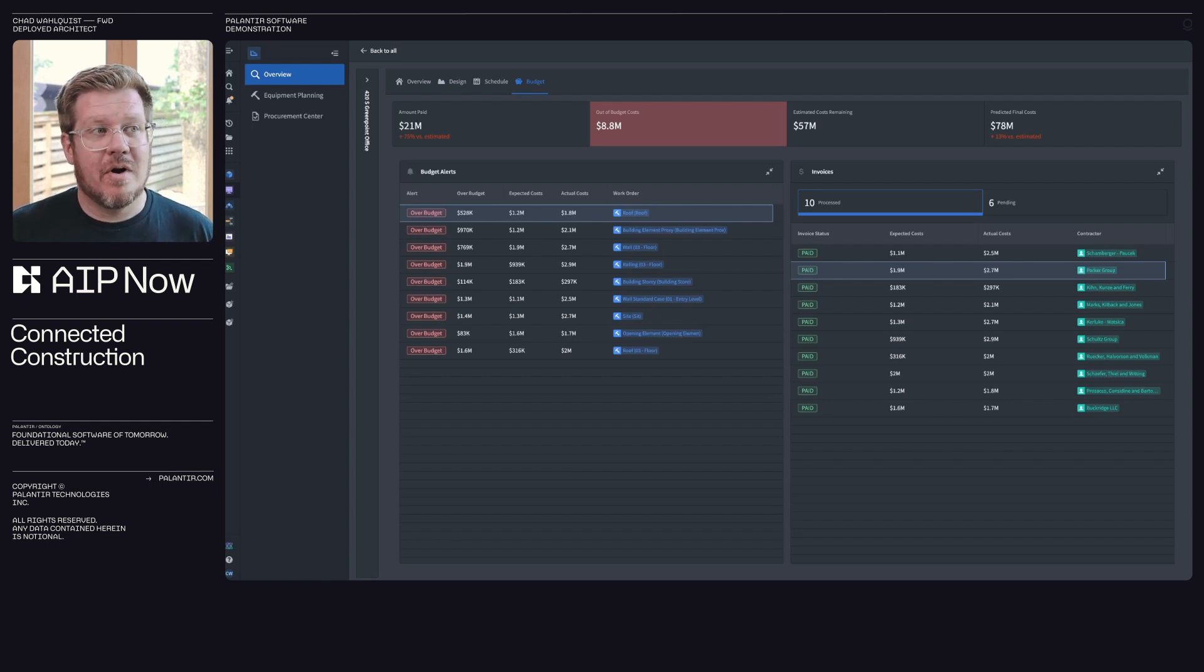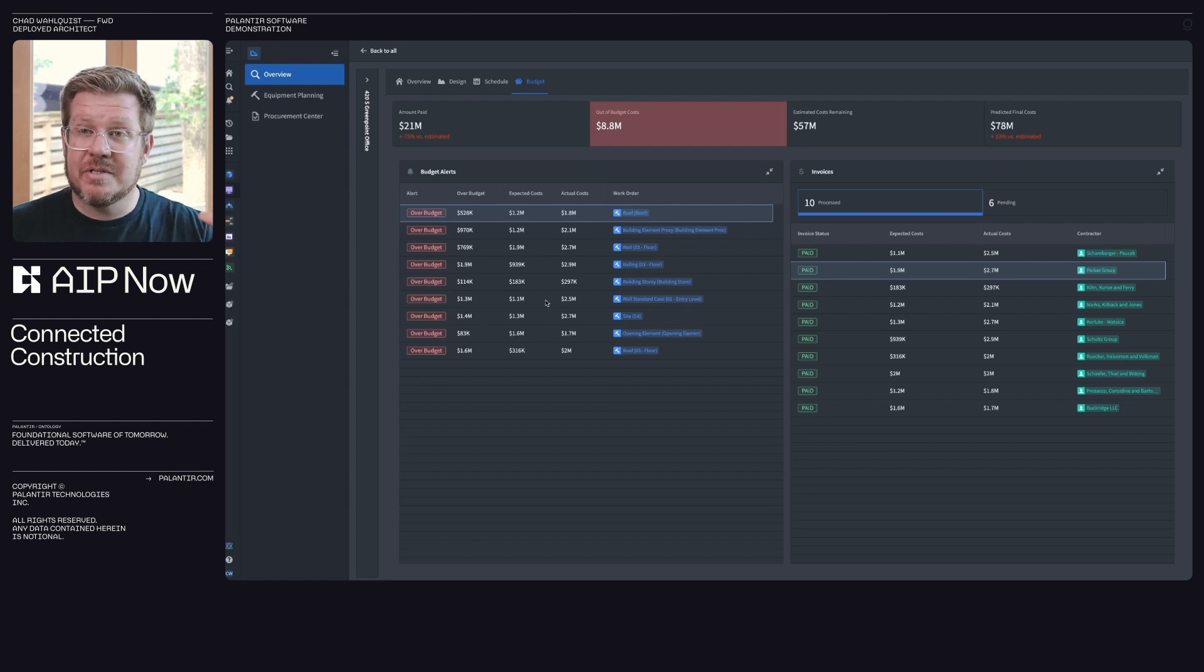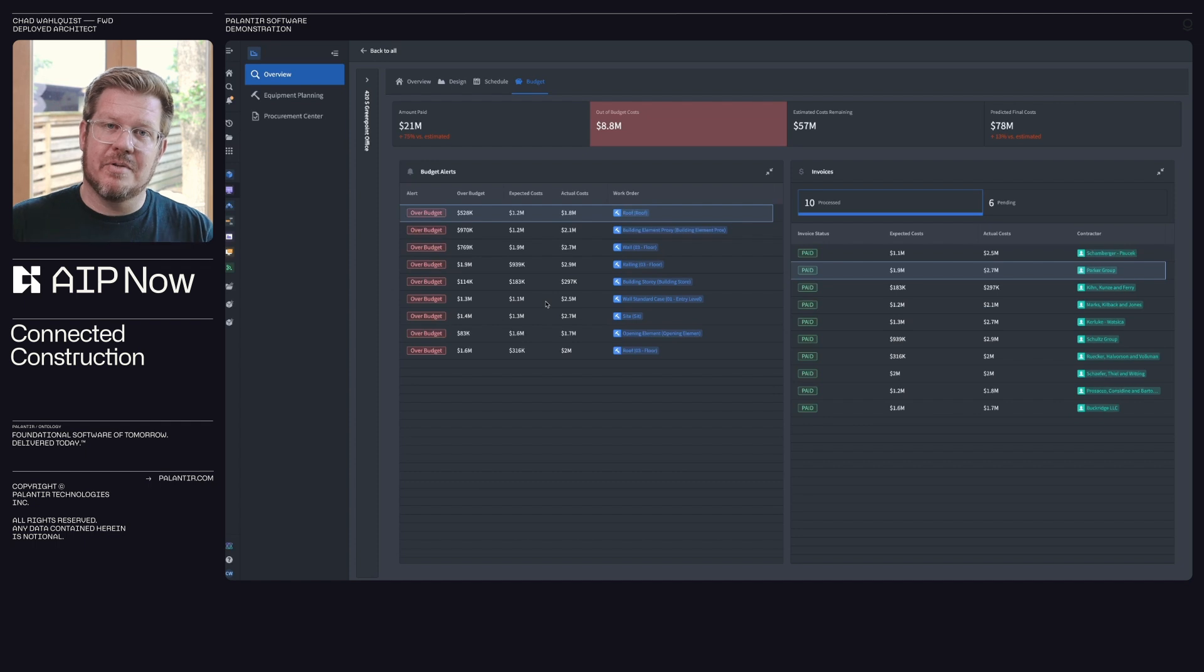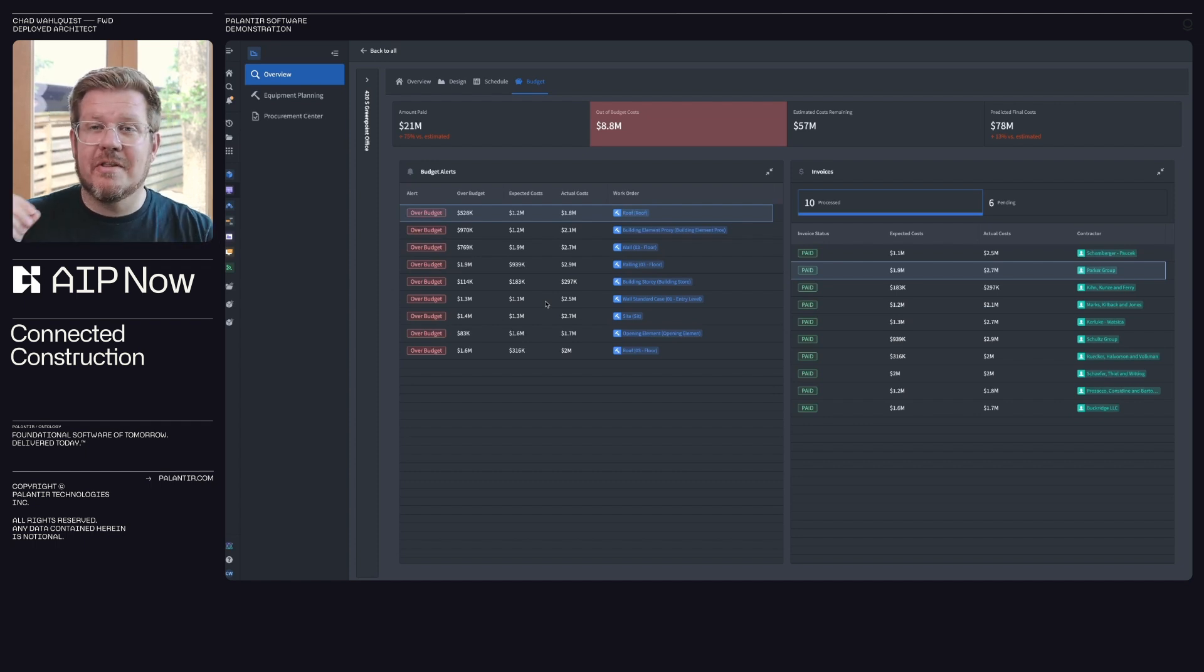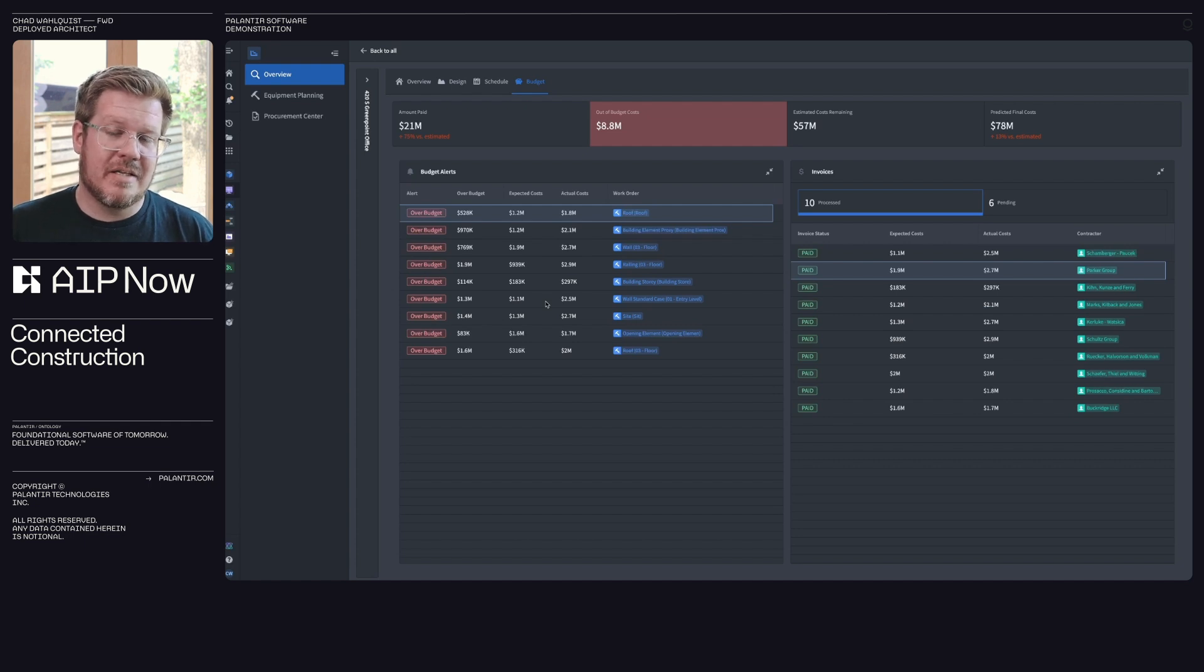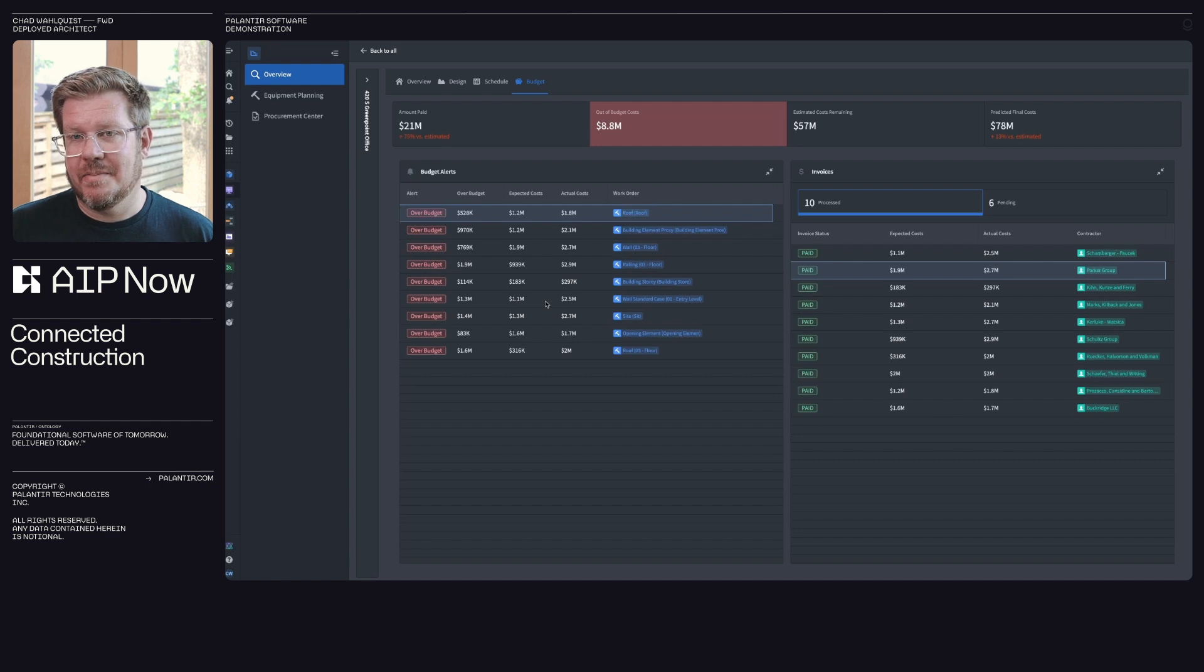So in this case, I can see where I'm running on my budget. I'm able to generate these alerts so I can stay focused on where am I varying from plan and I can go dig in because these are all connected through the ontology. I can look at this work order, understand the schedule, the raw materials, all the things that are needed, and I can triage and actually root cause fixing these problems before they get out of control, helping keep my project on time and on budget.